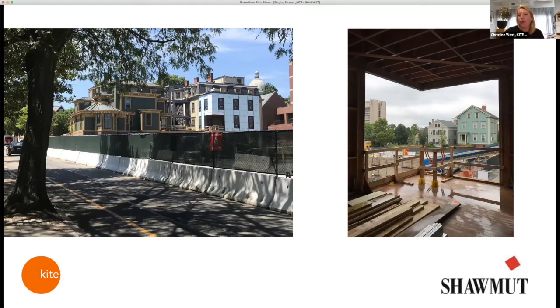So we would be working up the massing a week before it needed to be presented to DRC. Okay, that's approved. Now we can work on the detail, and we can get that done like a week before. So the approvals process was almost as much of a constraint as the construction, and everybody worked really hard to make sure it actually got approved internally, which was a challenge.